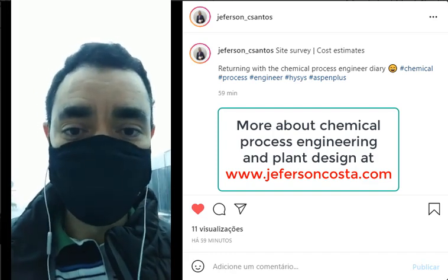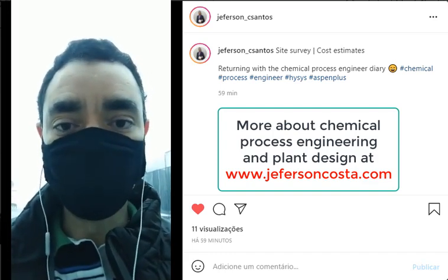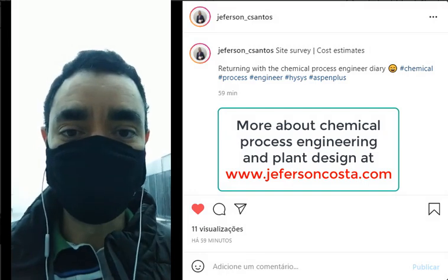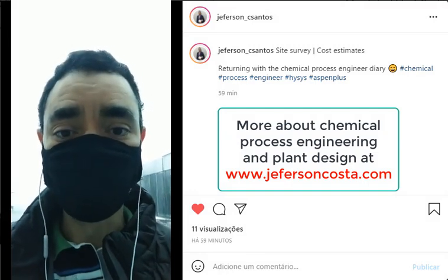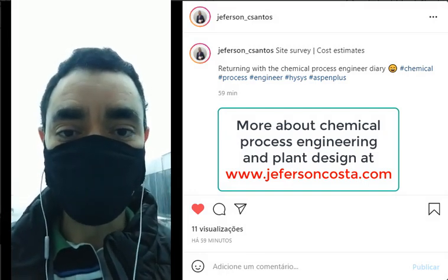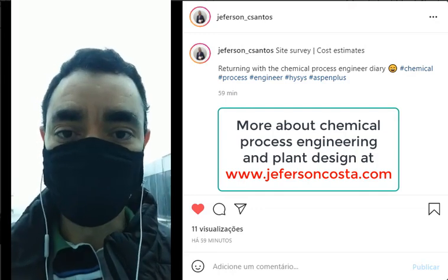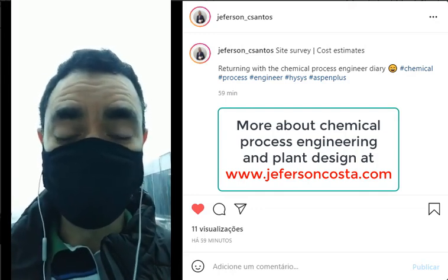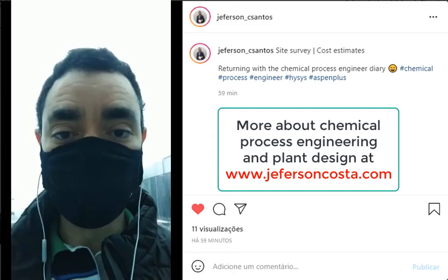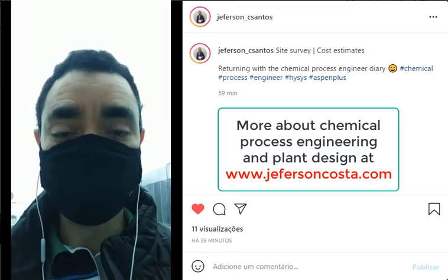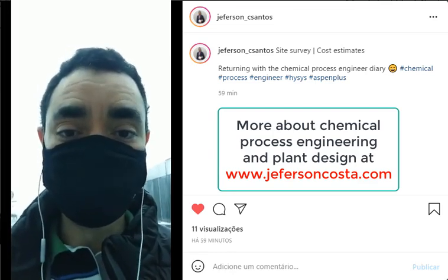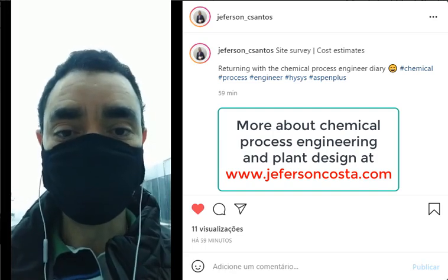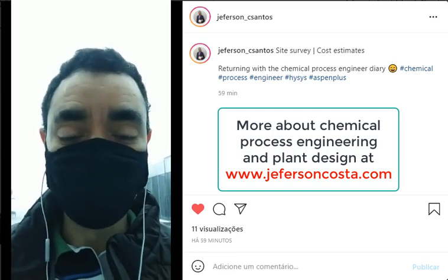For instance, the area available, what utilities are available, and access to the plant, and documentation that many times is available only in physical format, not in digital format. So these are some of the activities that we do during the site survey.